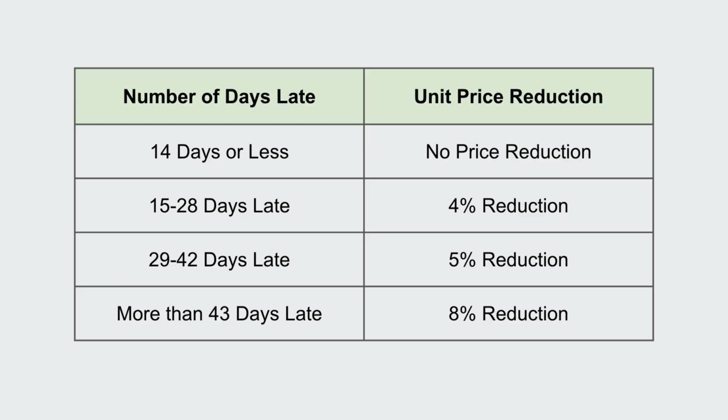The third one is lead time and delivery commitments. Lead time is one of the most common pain points between buyers and manufacturers. Your contract should state the duration from the date of the PO to the date of the shipment. Also define when the lead time starts. Sometimes it's from the date of the PO, and other times it's from the date the down payment is made. If delivery times are critical for your business, you may want to include penalties for delays. This is a way to reinforce the importance of staying on schedule and helps the supplier to prioritize your order.